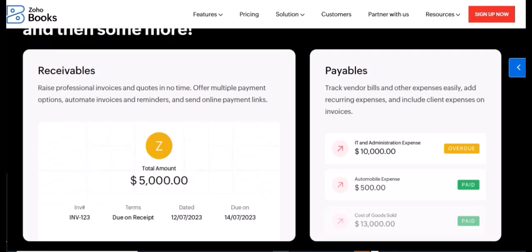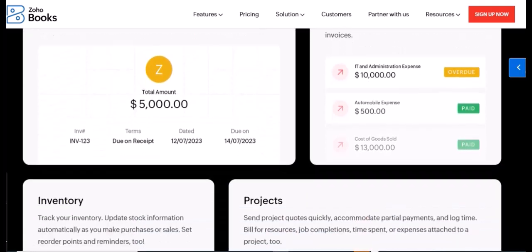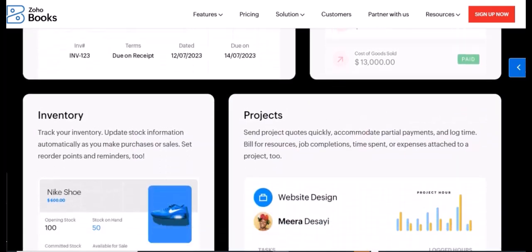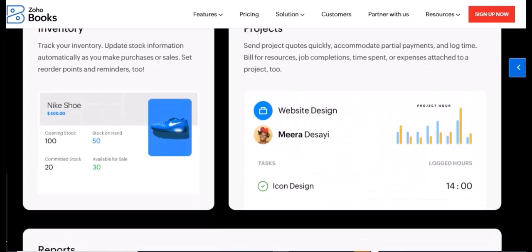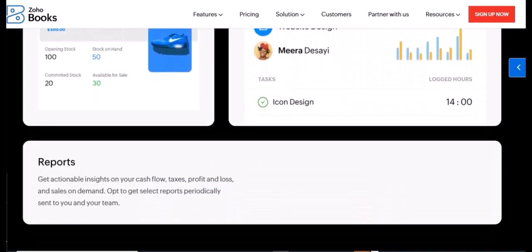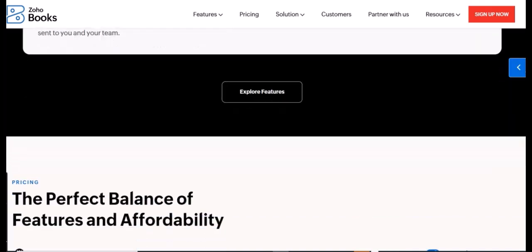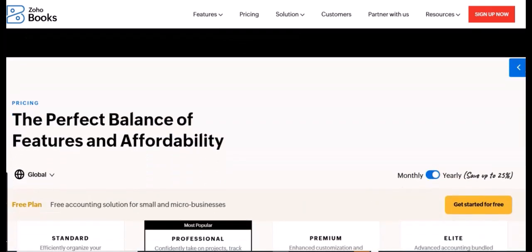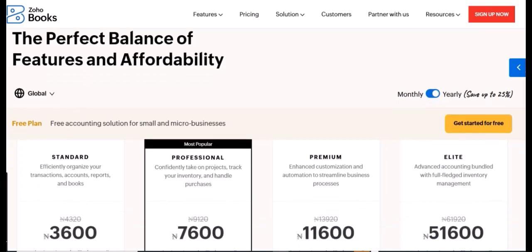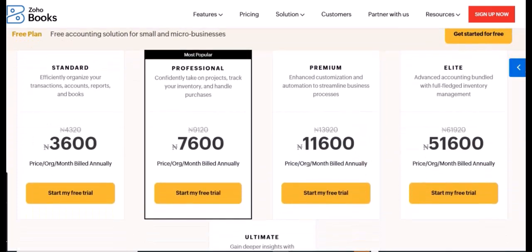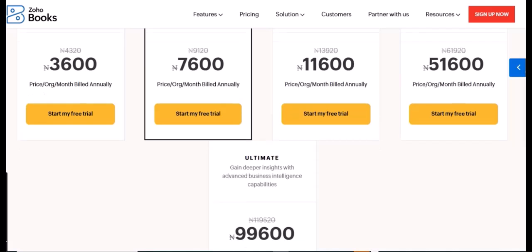Zoho Projects provides various ways to visualize and manage these tasks, including Gantt charts, a classic and powerful tool for visualizing project timelines, setting dependencies between tasks, identifying critical paths, and tracking progress against a baseline. This is where you can clearly see how one task's delay impacts others.